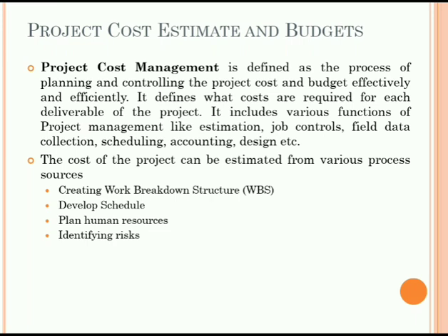The manager has a definite availability of these resources, and he has to plan the requirement of the resources over different periods of execution of the project. Therefore, some of the information and alternatives we can say here is that the total requirement of resources over its duration is given by the histogram. If the available resources are insufficient, it will result in delay in completion of the project. He has to decide the best allocation of available resources over the entire period of the project, so that the completion period of the project is extended by the minimum duration.